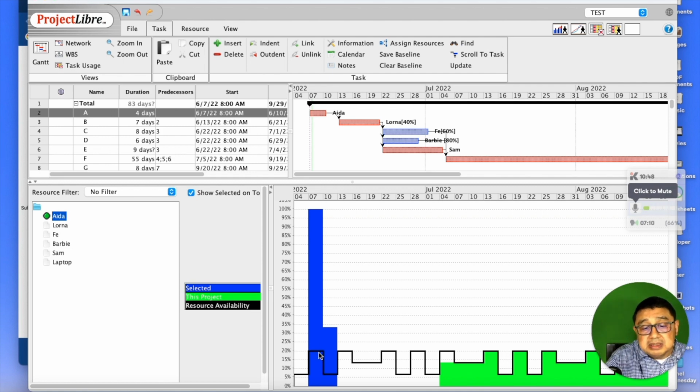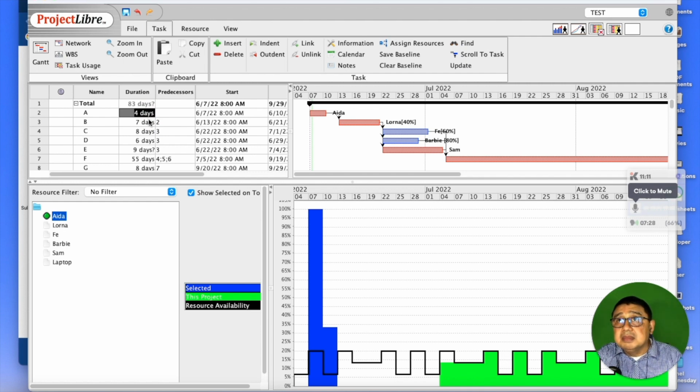So what are some of your choices here? You either increase Ida to about 100% worth of work per day, or you can spread the work out. It's 20%. So if Ida had 5 days, then she would actually need 20 days here to get 32 hours of work done, given her availability. Or you can pair her with another partner in the team so that the other partner can pick off from the slack that she is not able to work on, given availability considerations. That's an example of resource leveling.